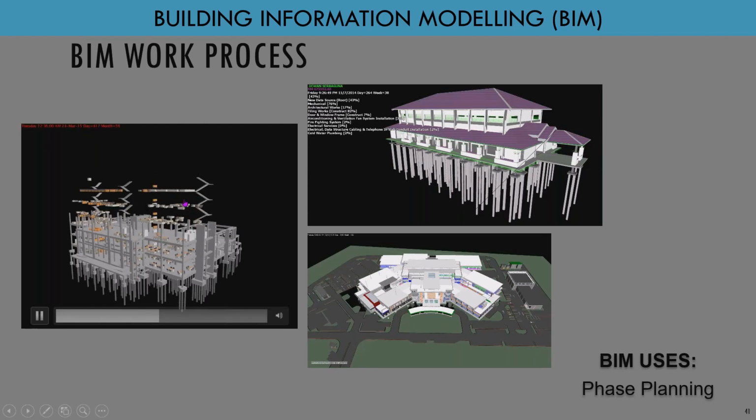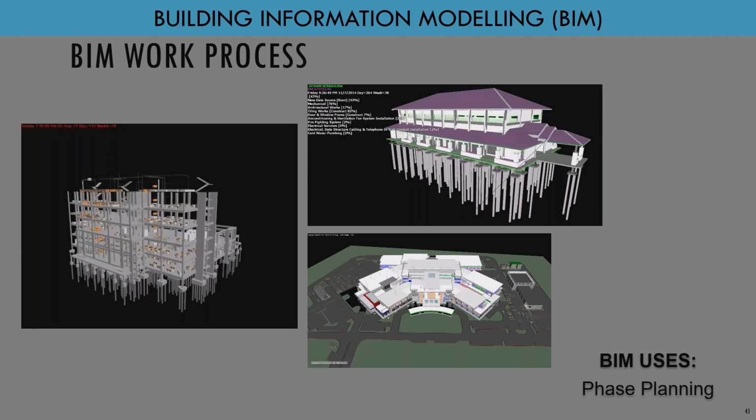If the planning and the sequencing of activities is wrong, we can verify it. The contractor needs to update their CPM to be realistic, so that the SO can approve the work program for their construction.